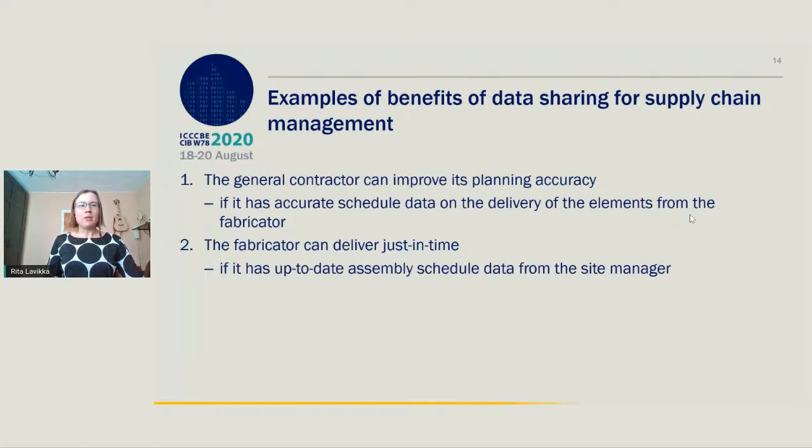Here are two examples of the benefits of data sharing for supply chain management. In the first example, the general contractor can improve its planning accuracy if it has accurate schedule data on the delivery of the elements from the fabricator. In the second example, the fabricator can deliver just in time if it has up-to-date assembly schedule data from the site manager.